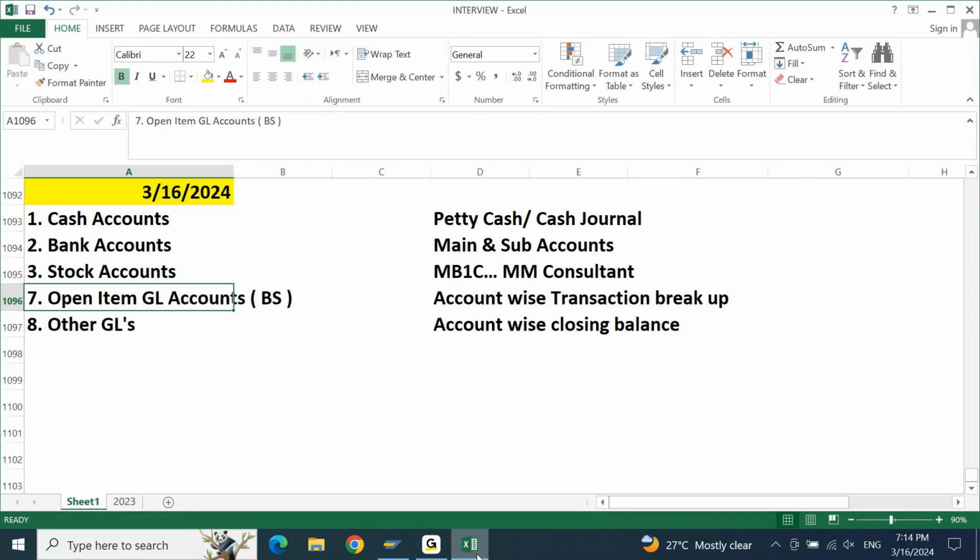You cannot sit and explain everything. What you will do, you will share the issue tracker, the issue log, whatever we have received during the hypercare period. Now, whether everything is closed or any issue is open, that also you need to give, open issues or open deliverables, whatever you have, so that if anything is pending which requires technical support or where the functional support